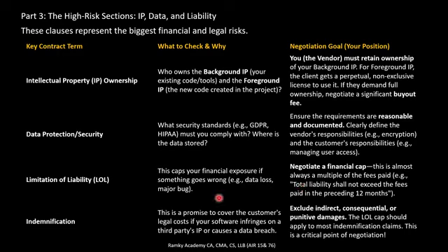And limitation of liability, we always need to fix the cap, like total liability shall not exceed the fee paid in the preceding 12 months, so that the cap will be protected and liability will be limited. And indemnification is the promise to cover the customer's legal cost if the hardware infringes on a third party's IP and causes a data breach.